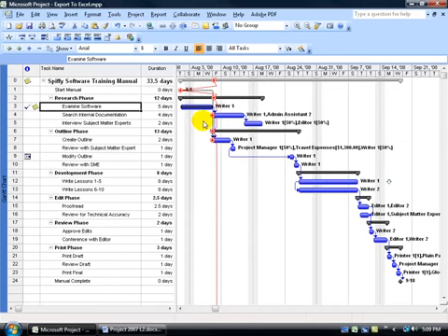Notice how that progress line for that particular point in time, that status date of August 8th, now instead of going back, shows that it was completed at that time. In fact, maybe just a little ahead of schedule because now it's bending over to the right. To exaggerate, let's come down here and say that this task is completed 100%. Well, at that point in time, again, it's bending to the right, so there's the line and it's bending over to the right. So we're ahead of schedule with those tasks. So at that point in time, I can say, wow, these other tasks were behind a little bit, were just behind on starting and weren't progressed, but these other tasks were ahead of schedule.